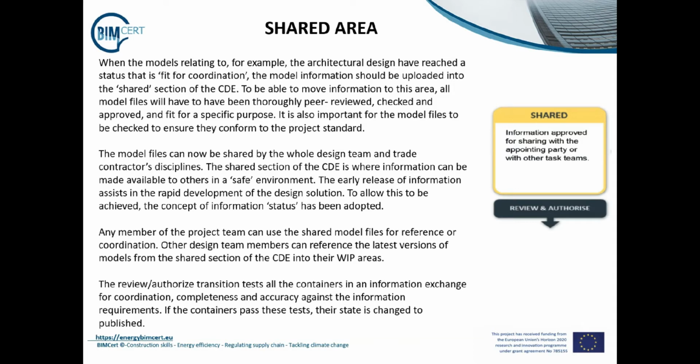The shared section of the CDE is where information can be made available to others in a safe environment. The early release of information assists in the rapid development of the design solution. To allow this to be achieved, the concept of information status has been adopted, which we will look at in the next part. Any member of the project team can use the shared model files for reference or coordination. Other design team members can reference the latest versions of models from the shared section of the common data environment into their work in progress areas.